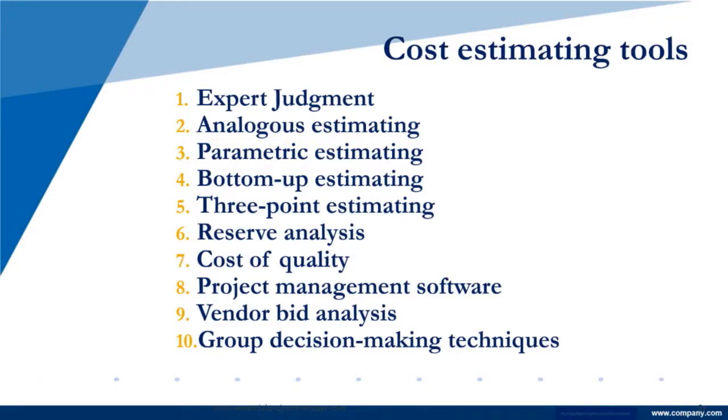And again, we have group decision-making techniques that we use in our cost evaluation. It's bringing the experts together and saying, what do you think? It can be formal, it can be facilitated, it can be very structured. It can be using different types of survey tools to ask different questions specific to costs that people know because they do it every day. You can involve accounting, HR, technical services. It really depends on your project. It makes sense to bring these people together, if for no other reason, to validate and get buy-in to the estimates that you're giving. Again, it's time-consuming, it can be costly, and you have to make good choices for your individual project. It's a tool. Use it if and when it's needed.